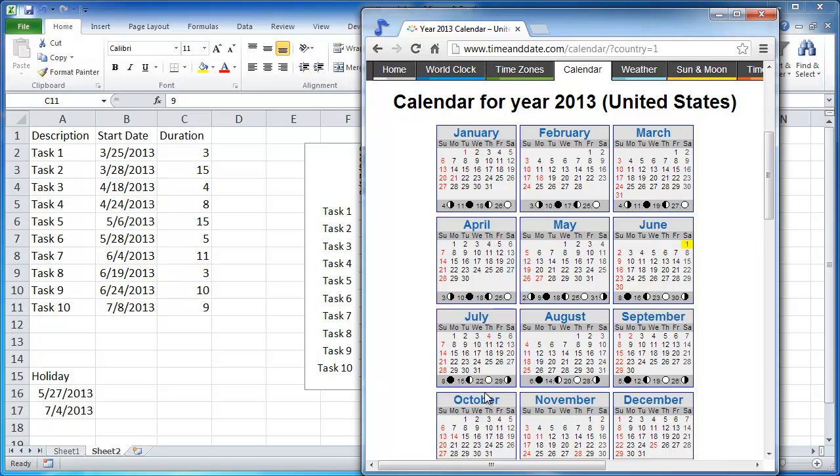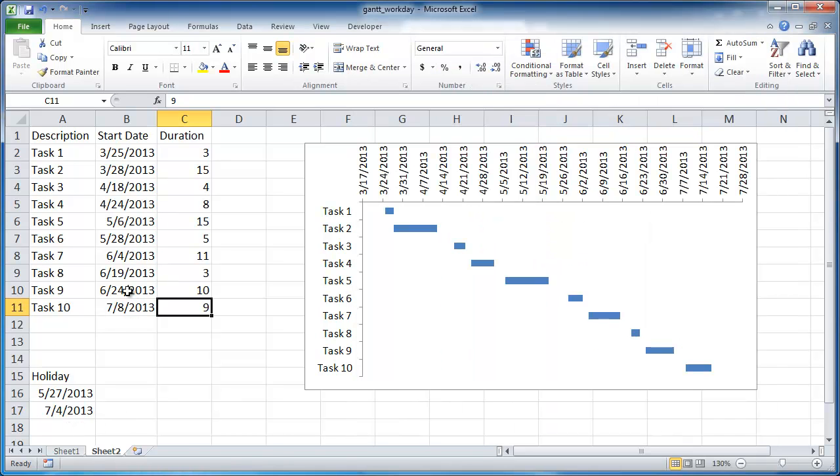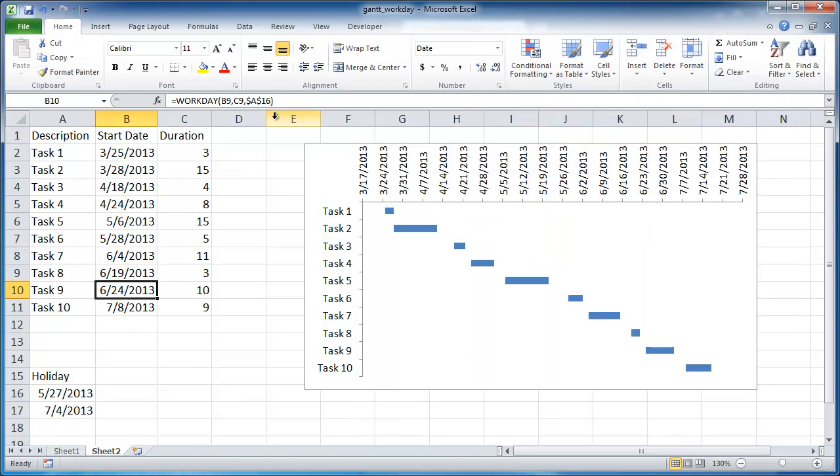So what happens here is it's going to go 10 days, right? So 6/24, we're going to go 1, 2, 3, 4, 5, 6, 7, 8, 9, 10. So it's going to start on the next one should be 7/8, right? But since we didn't include July 4th as our holiday in our formula here, it's not going to pick it up.